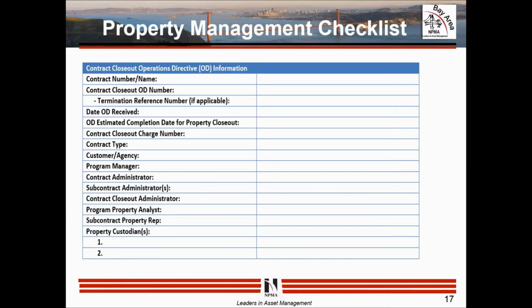It just helps us there. We review it all the time as we go through processes and period of performance. We're working with our contracts teams there as well. As I go into the next slide, steps to ensure success for us. Obviously, when you get your contract, you're going to review your internal systems for property. Property is both, as we know, equipment and repair material. So you should check all systems which may contain property. If you've got multiple sites, that may mean multiple systems.